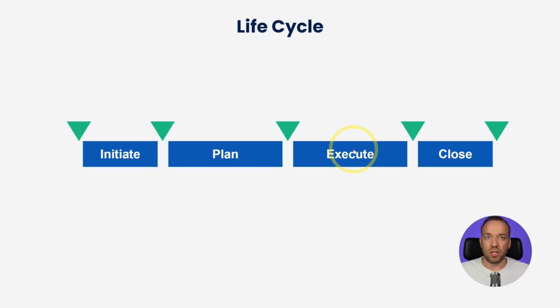Projects are about delivering change. So the way you deliver the change is through work, which is the execution. So that's the first one. You remember the one in the middle, execution. But before you do any execution, the one before that is planning. And by default, projects are complex, so you need a team. If it was easy, you wouldn't need a team, right? So you need expertise. To be able to do the plan, you need people on your team who can provide the estimates, and you collect those people during the initiation phase. So prepare, plan, execute, and finally close. That's the logical way to remember the life cycle.